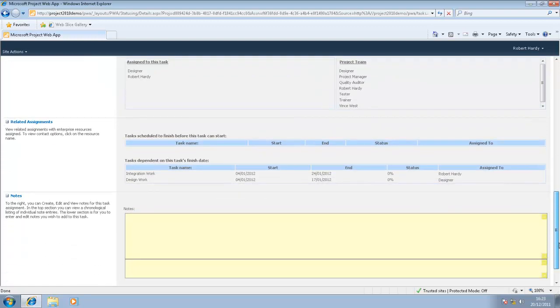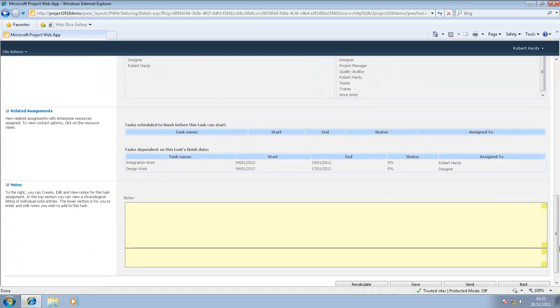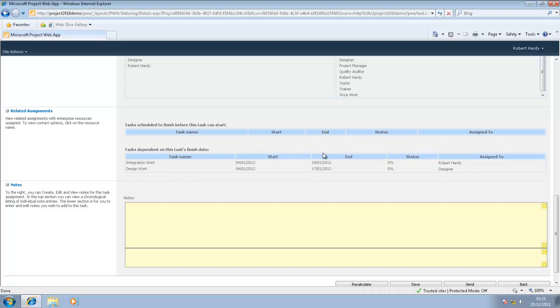If I scroll down further, I see related assignments. Here I can see which tasks are scheduled to finish before this task can start, and there aren't any in this particular example. But I can also see which tasks are dependent on this task's finish date. Here we can see what the impact would be if I didn't complete my work on time. I can also see when these other tasks are due to start and when they're due to finish, and who's been assigned to them.